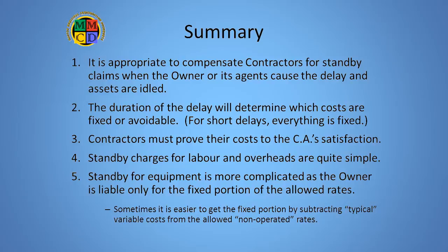So, to summarize, number one, it is appropriate to compensate contractors for standby claims when the owner or its agents cause the delay and assets are idled. Number two, the duration of the delay will determine which costs are fixed or avoidable. Remember, for short-term delays, almost everything is fixed. Number three, contractors must prove their costs to the CA's satisfaction, or the CA can substitute his or her own judgment.